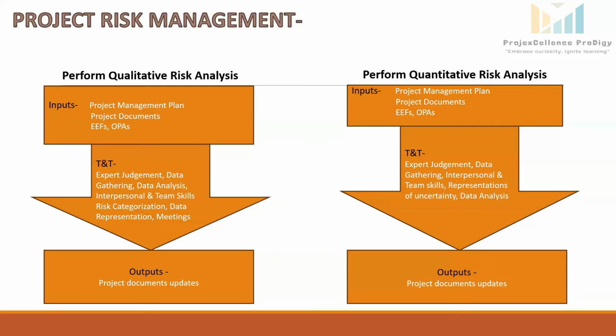Data analysis technique. A very common method is simulation or Monte Carlo analysis. We run multiple scenarios to predict the likelihood of project completion within budget and schedule. For example, we can run, let's say, 10,000 simulations on project cost, which will predict there is an 85% chance that the total cost will stay below a certain figure, let's say $15 million.